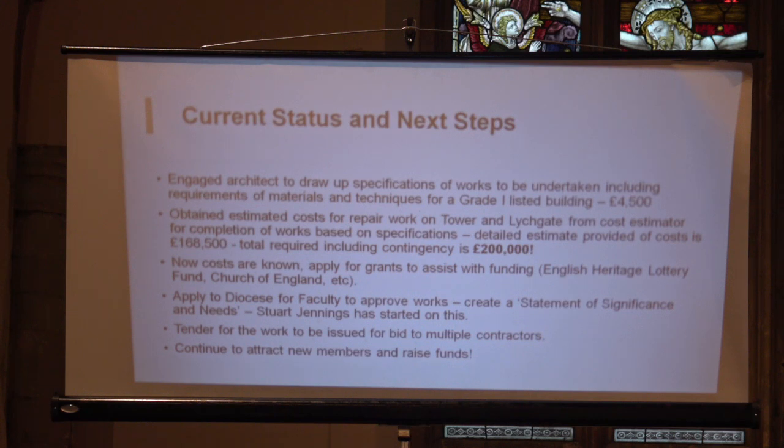So we probably need to think about that. It says, and this is one of the things I need to follow up with the people who've done the costing, to find out what they've included, because it says construction site cost list of exclusions, no allowance to be made for the following, and one of them was, it says, phase them.